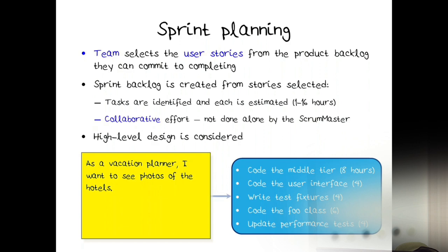So the team sits down and looks at these tasks, and somebody might have no idea about how to carry out the task. Is this going to take an hour? Is it going to take 16 hours? Somebody else might know how to do it, so they know it's going to take 1 hour. So the good estimate for that would be 1 hour if somebody knows how to do it. You have some high-level design.